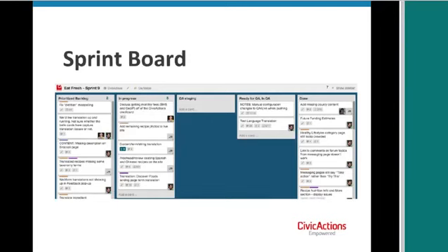What I would rather see is each person has 1 item in progress. Then when it's done, it's moved to QA staging, means it's ready to put, and then ready for QA, and then once it's past QA, it's moved to done. And this is a good visual demonstration of the work in progress and where it is and how they're doing.